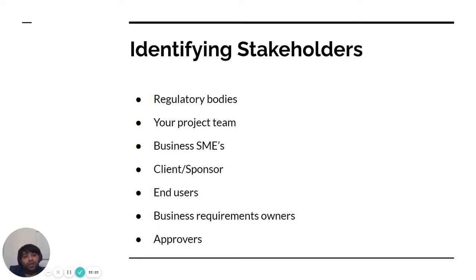Now that you have the list of stakeholders, it may be a too high-level list, or probably outdated. So refine the list from whatever existed, and then talk with the people and the project manager. You have learned from your past projects that SME people would be the same, and those kinds of things. Then you have created one list. Before you reach out to them, you have to make sure it is a correct list. Check in the system whether those persons are still working or not. Sometimes people change their jobs and are not working there anymore. So just double check before you approach somebody. This is a quick tip on how you identify the stakeholders.